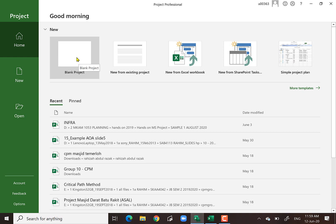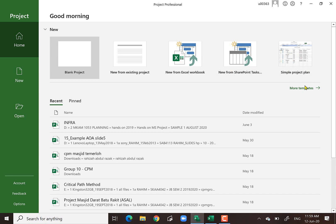Normally we start by opening up a blank project. When you are connected to the internet, there are basically samples or templates available from Office that you can use. For construction there are a few templates, but bear in mind the templates basically belong to the USA ways of doing things. However, most of the activity or task names are almost similar. If you do not know how to start a schedule, you can just get any template and do the modification from that.